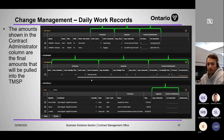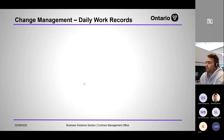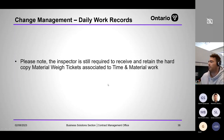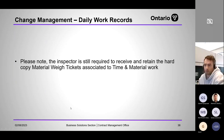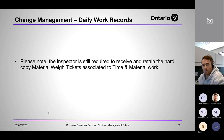The amounts shown in the CA's entries in the final right-hand columns will be what's pulled into the TMSP. Please note the inspector is still required to receive and retain the hard copy of the material weigh ticket — don't assume you can throw those out. We still need a copy and still require CAs to provide hard copies at the end.